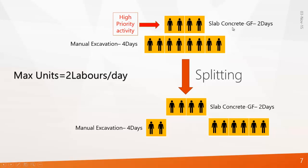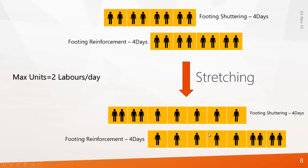Another option is splitting. Let's say there are two activities: slab concrete for two days and manual excavation for four days. In this example, slab concrete is set as a high priority activity — you cannot delay it; it has to start on time. So what do you do? You start manual excavation on the very first day with two labor forces. When it reaches the second day, since you cannot delay slab concrete, the laborers start working on it, meaning they are not working on manual excavation for those two days. After completing slab concrete, the laborers engage on manual excavation for its third, fourth, and fifth day. You have split the manual excavation activity. This process is called splitting.